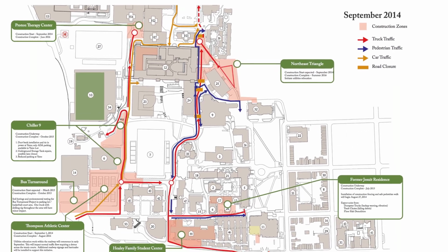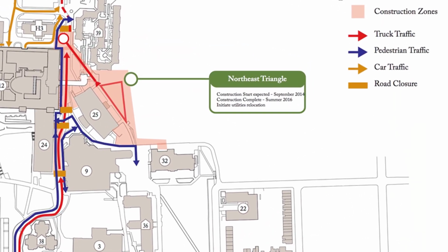But we should really put that main signage, maybe not all of the signage, but that main signage, on our job site layout plan. We need to put those barricades and that pedestrian traffic route on our job site layout plan, so that is shown. But all 7 of these things, you need to go through them and make sure that you either need them or don't need them on your job site layout plan based on the type of job you're doing. Maybe you're doing a job that doesn't have a crane, so you don't really need to worry about that part of it. But go through all of these and make sure that you have all of these on the job site layout plan.